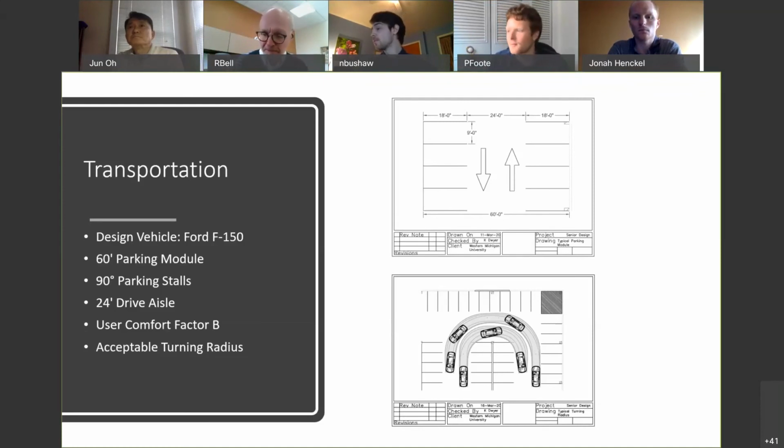In terms of the decision to make this project design build, we were focusing more on trying to meet our schedule demands. We understand that there are other delivery methods we could have gone with, like bid build, which would have given us a much greater range of options and prices. But to accommodate our schedule, we went with design build so that we could take away the bid phase and go right into construction, and the whole team would have much easier communication between our designers and builders throughout the process.